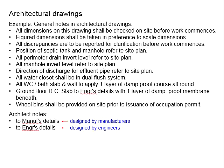Let us look into each one. First: all dimensions in this drawing should be checked on site before the work commences. The architect requires you to carefully check dimensions before starting construction work on site. In the case that any error appears, you need to quickly refer to the architect and seek clarifications. This is a good preventive measure so that any errors are rectified before commencement of work.